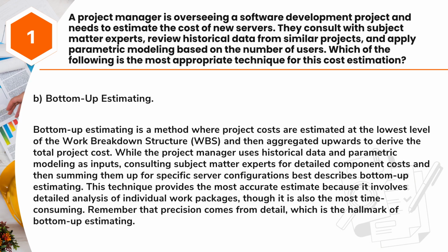This technique provides the most accurate estimate because it involves detailed analysis of individual work packages, though it is also the most time-consuming. Remember that precision comes from detail, which is the hallmark of bottom-up estimating.